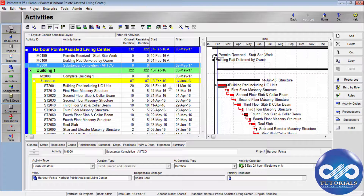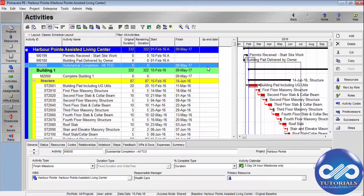Now let's see the most important type of user-defined field: indicators. Indicators are a special type of UDF that enable you to select color-coded icons as values displayed in columns. You can group, sort, run reports, and use them to highlight activities, activity steps, resource assignments, projects, WBS, expenses, issues, and risks.